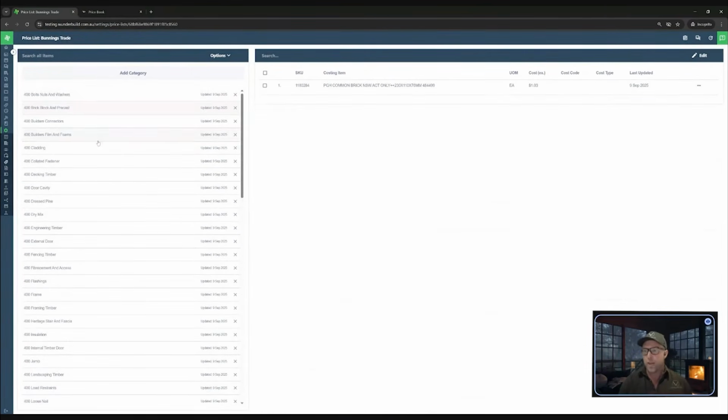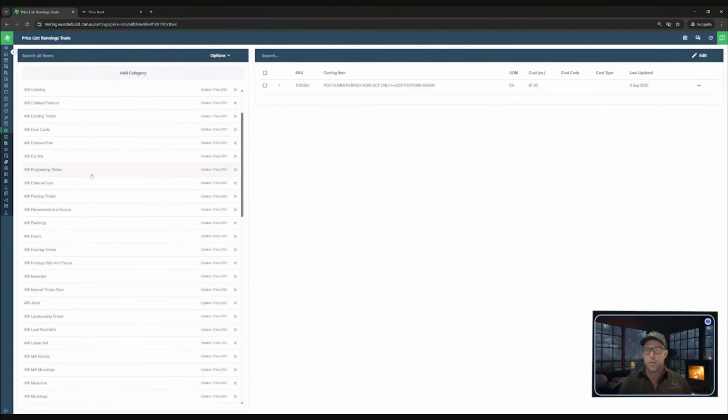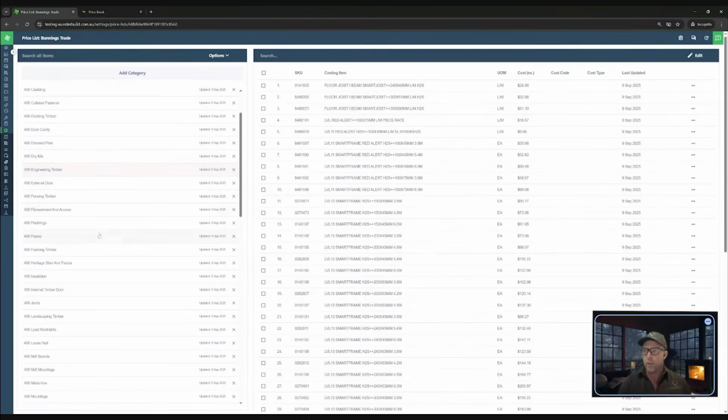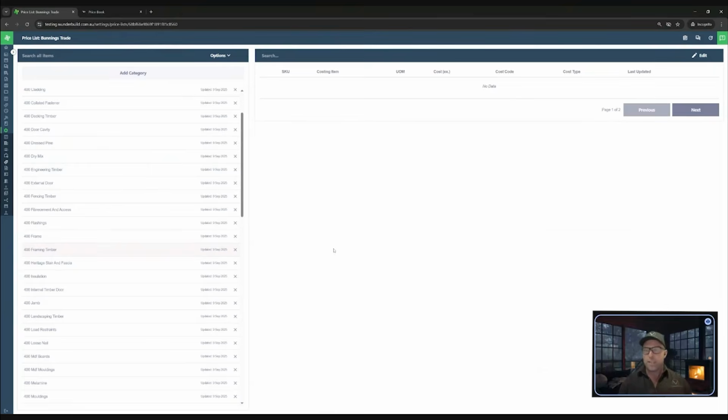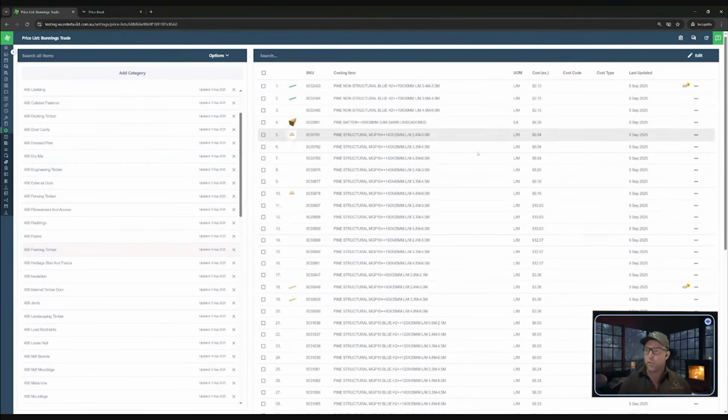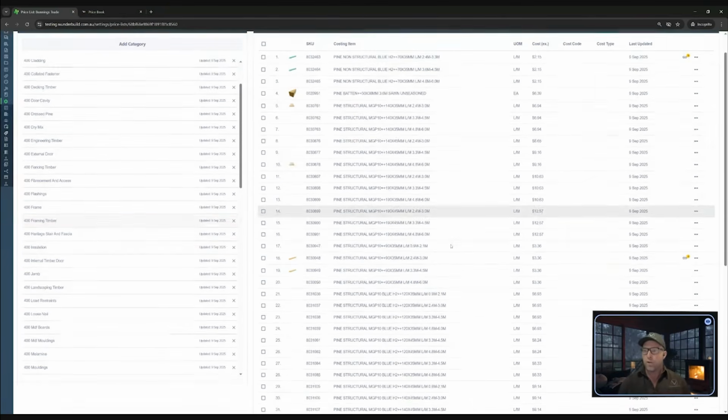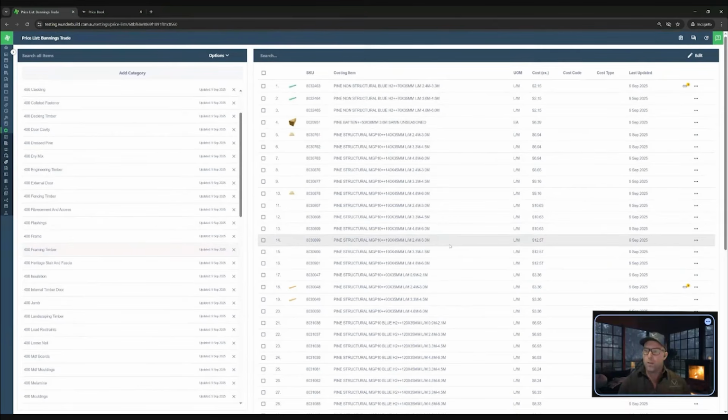So they should be able to export a price list to you, and then you should be able to map it into Wunderbuild. And then the idea behind that is that maintaining it is simply requesting the updated price file from them every 2 to 3 months. So it's eliminated actual manual entry. It's eliminated actually going into your master price list and entering that data.